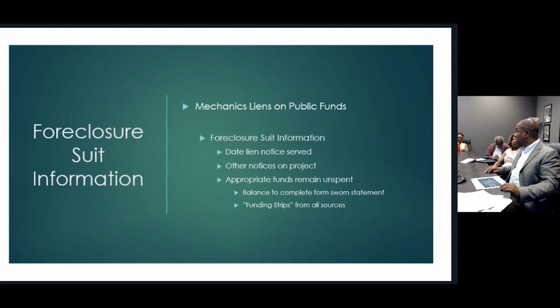Other notices on the project. This is that due diligence thing I talked about before. You got to see if there's been other claims filed on this particular project, because what the judge would like to do is to merge all of those claims so that this thing can be heard all at one time. So he's relying on you as a claimant to include all the other claimants that may be part of this particular suit.